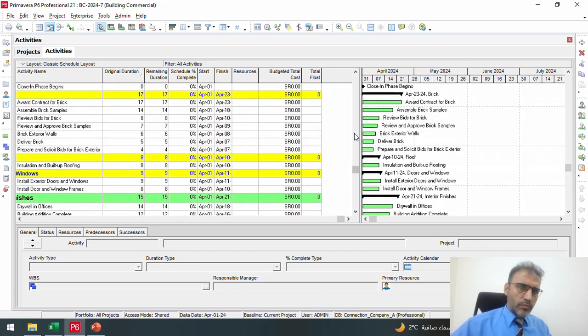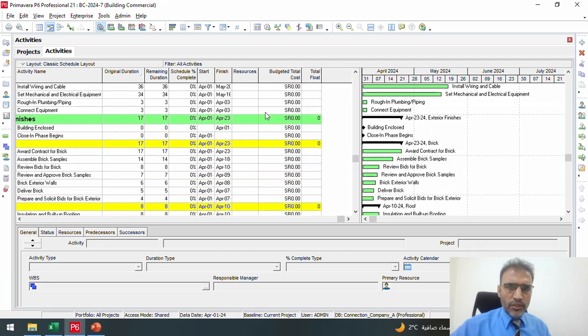Right now, we see that the project schedule has not been accomplished yet because we did not make the relations. If we didn't make the relations, all the activities will be starting on the same date, which will be the first date of our project, which is not realistic at all for our planning scenarios. Right now, we need to see how we can set the relation, but before doing that, we need some introduction about what the relation for the activities is.